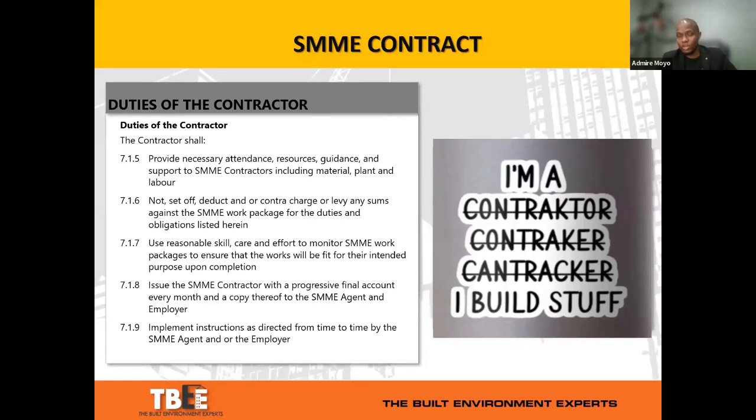So hence the importance of issuing some form of final account on a progressive basis, on a monthly basis, and explaining to the SMME contractor that this is the status of your intended final payment, so that expectation and reality are reconciled on an ongoing basis, and it's not something that is left to the final account where suddenly the SMMEs then engage the community and they want to blockade the construction site, or there's vandalism on site and so on, and it leads to various issues.